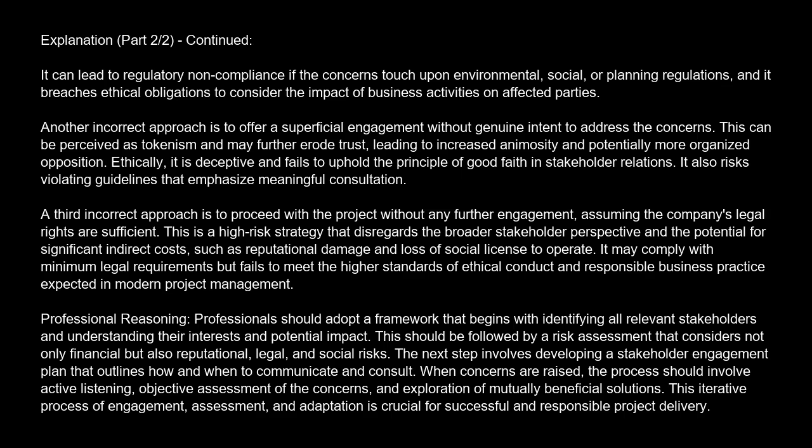Professional reasoning. Professionals should adopt a framework that begins with identifying all relevant stakeholders and understanding their interests and potential impact. This should be followed by a risk assessment that considers not only financial, but also reputational, legal, and social risks. The next step involves developing a stakeholder engagement plan that outlines how and when to communicate and consult. When concerns are raised, the process should involve active listening, objective assessment of the concerns, and exploration of mutually beneficial solutions. This iterative process of engagement, assessment, and adaptation is crucial for successful and responsible project delivery.